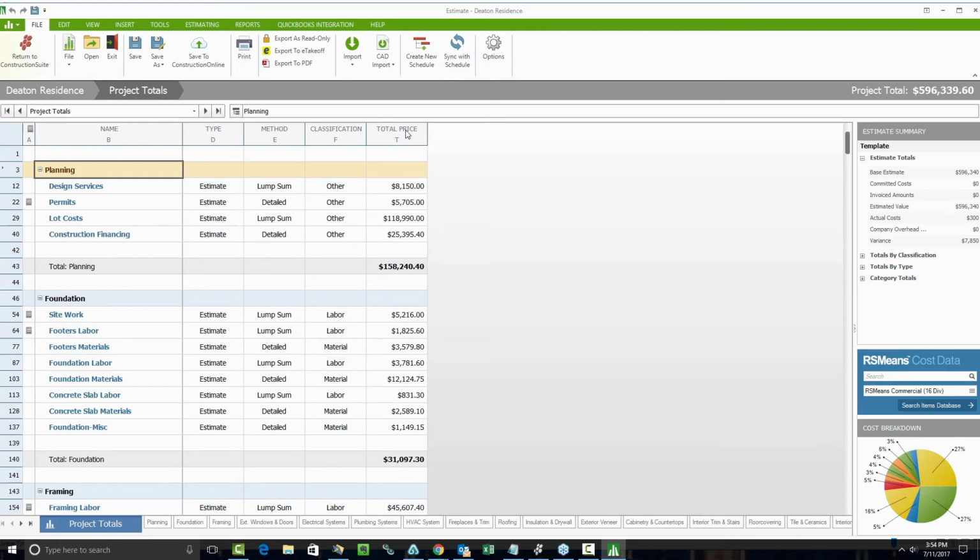You've got, realistically, I think 3 totals columns. There is an estimate column, which is just an extended cost. It's literally quantity times cost. Beyond this, you're going to have a total cost, which is how much you should expect to pay, and then a total price, which is how much you're charging your customer for this line item.